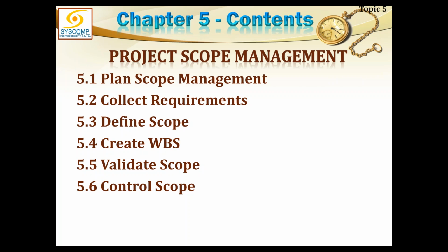So this was the requirement and that is the deliverable. So how are they connected? Every requirement must be connected to the deliverable. If it is not connected to the deliverable, that means that requirement is not being fulfilled.